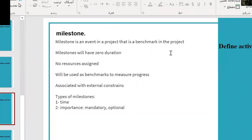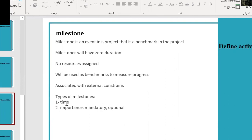A milestone is an event in a project that serves as a benchmark. Milestones have zero duration and no resources assigned. They are used as benchmarks to measure progress and are associated with external constraints. There are two types of milestones: with respect to time (start or finish) and with respect to importance (mandatory or optional). Categorizing milestones correctly helps us deal with them without taking risks or changing the plan unnecessarily.